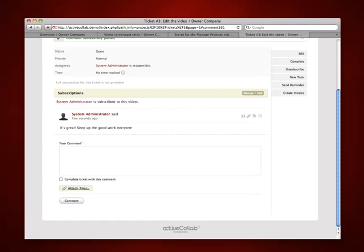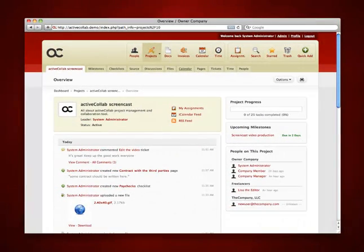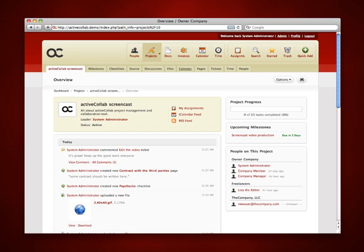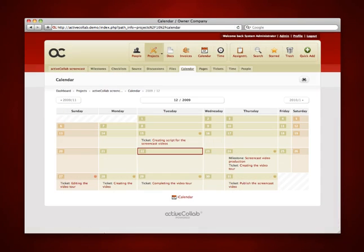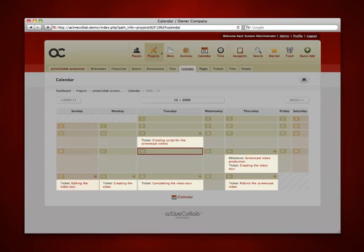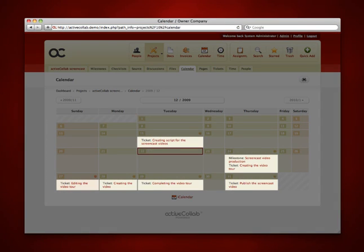Another handy tool you can use while working on your project is calendar. Calendar gathers all milestones and tasks from the project and displays them on the day they are due.